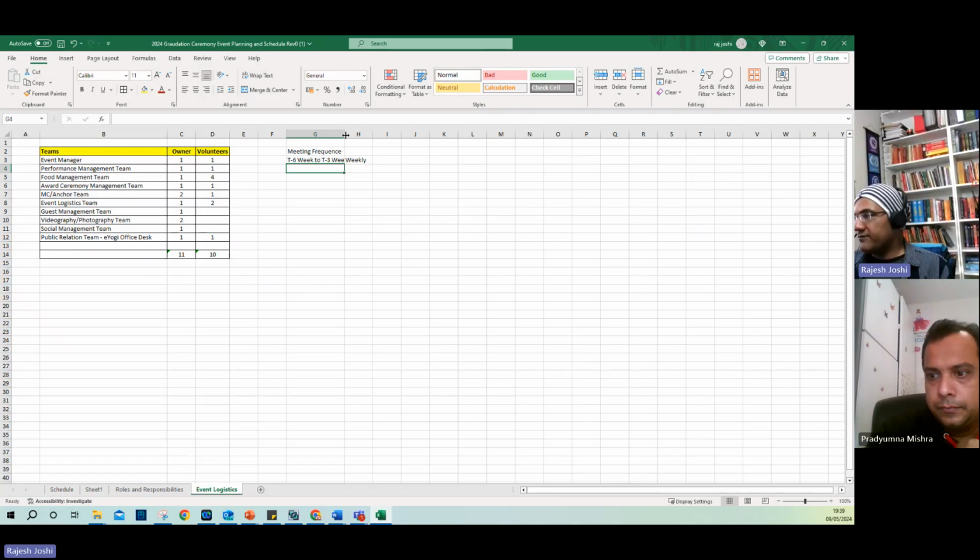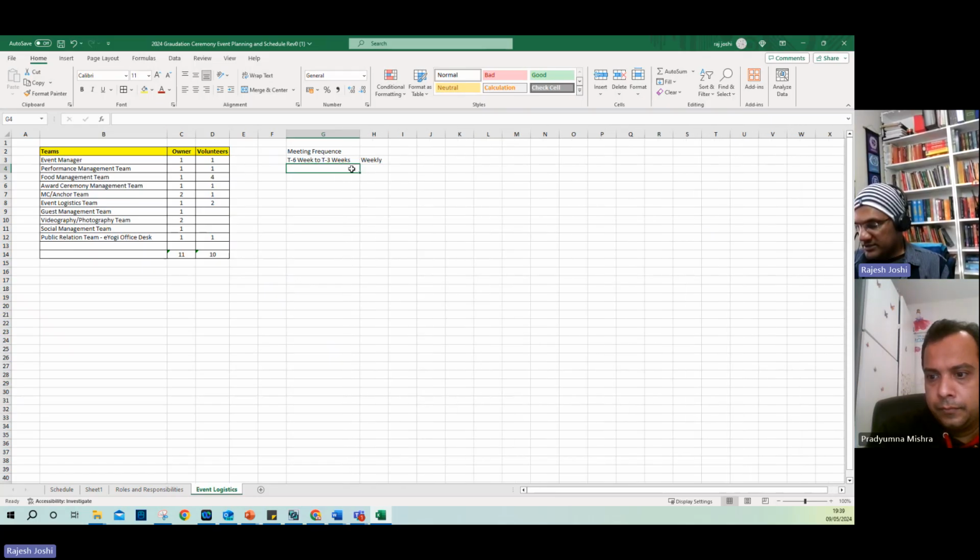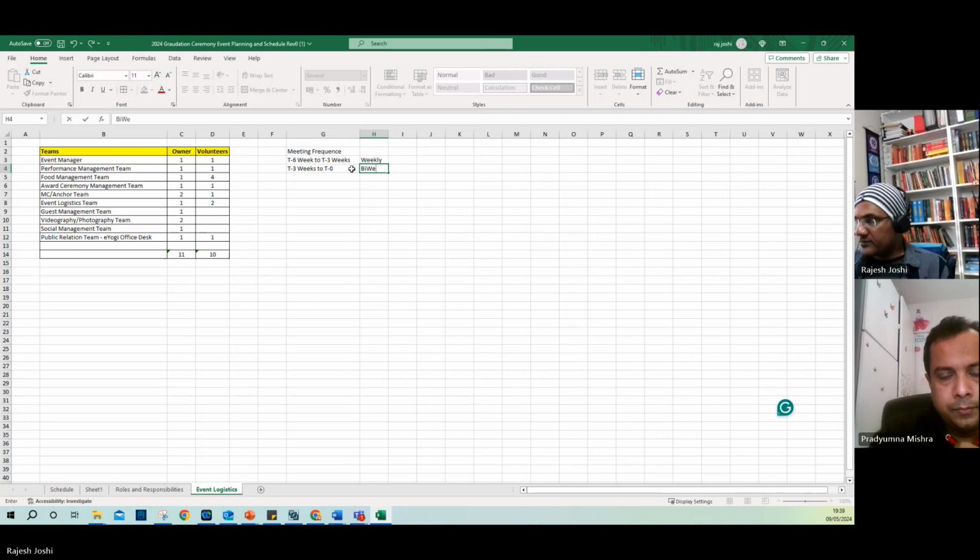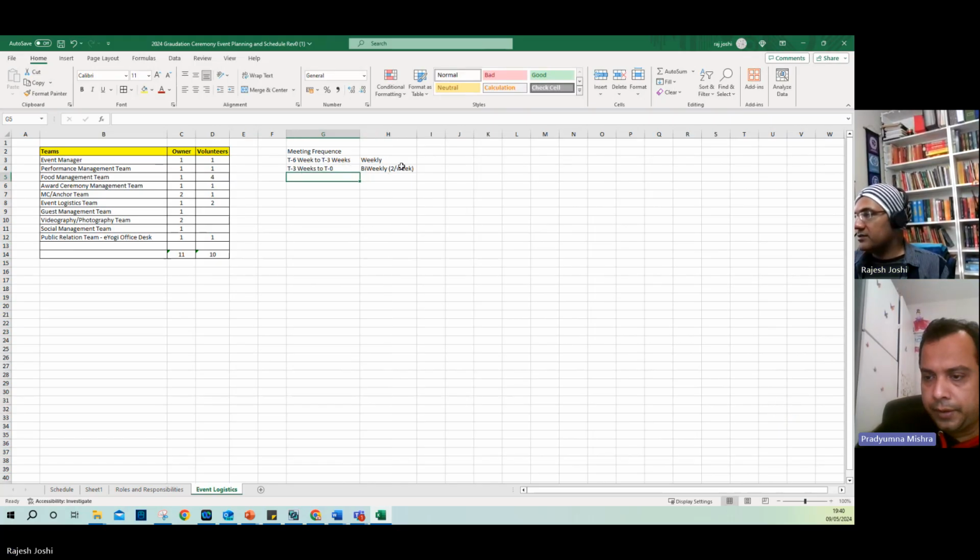Until then, we are meeting weekly. T minus 3 weeks to T minus 0 will be bi-weekly, 2 per week. So one Tuesday, one Friday, whatever way we want to spread. One midweek, one Friday, probably.